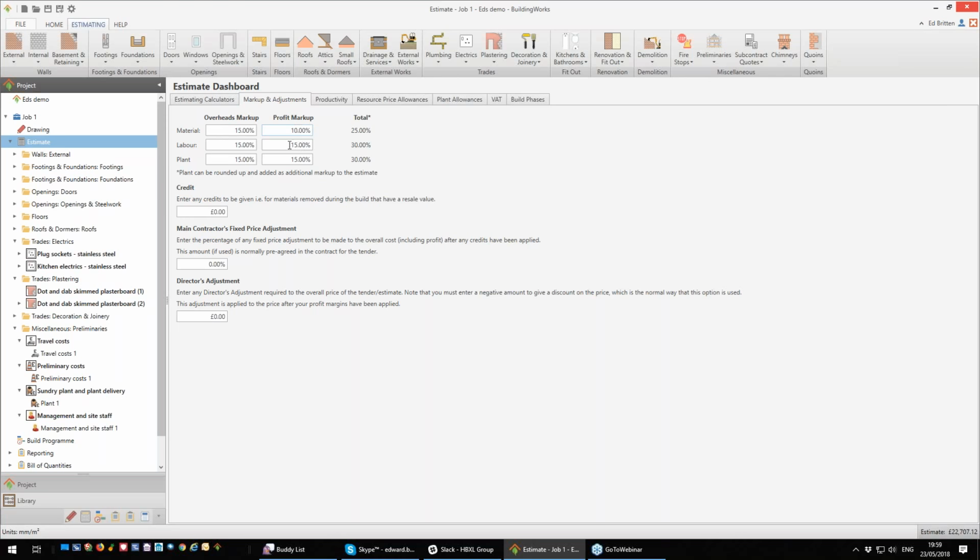So if you think the end price is a bit high, you can drop these down to 10%. So that's your net figure. If it's a job that you're desperate to get, go down to that. Okay. The company's fixed costs are being covered, you're still making a bit.